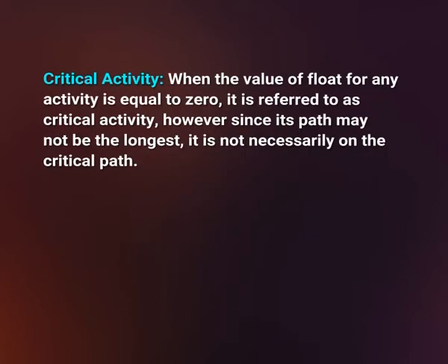Critical activity. When the value of float for any activity is equal to 0, it is referred to as a critical activity. However, since its path may not be the longest, it is not necessarily on the critical path.